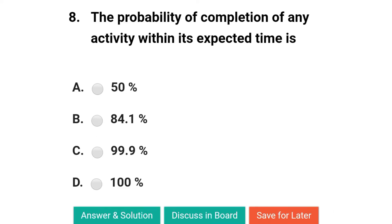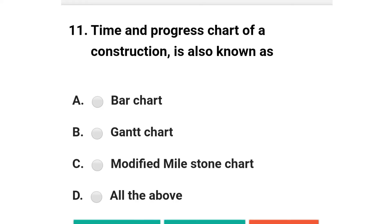Next question: the probability of completion of any activity within its expected time is — option A: 50%; option B: 84.1%; option C: 99.9%; option D: 100%. The correct answer is option A: 50%.